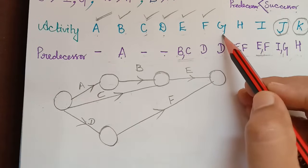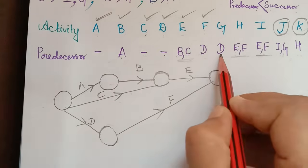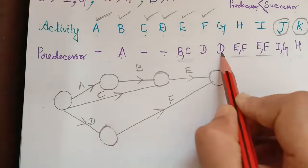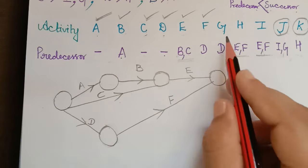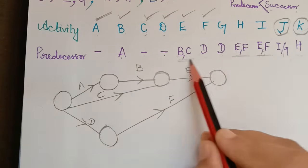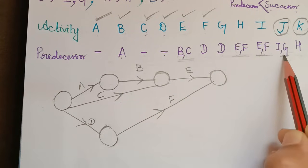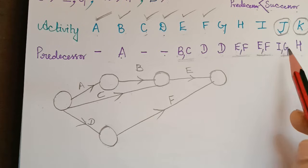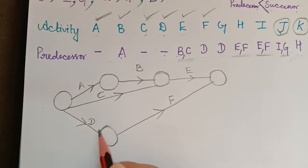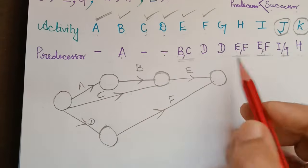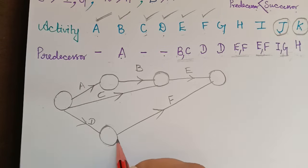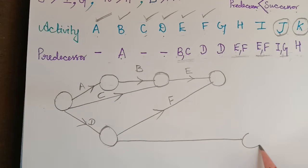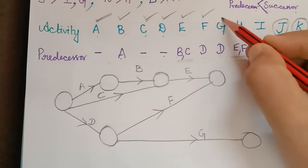Next is activity G. Its predecessor is D, so the starting point is D's end node. Checking the predecessor list, G appears with activity I, which has not been constructed yet. So we need not fix the ending node yet — we draw G from D's end node to a new node.